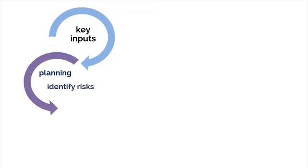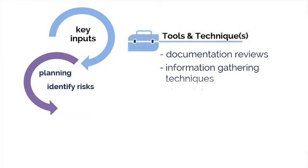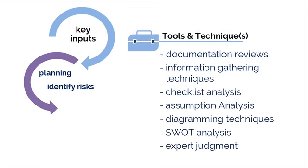In addition to many inputs, the Identify Risks process of project risk management involves seven tools and techniques to achieve the output of this whole process, which is the risk register. The first is documentation reviews — we review all of our files, documents, and plans for quality and consistency so that we can identify possible risks to our project.